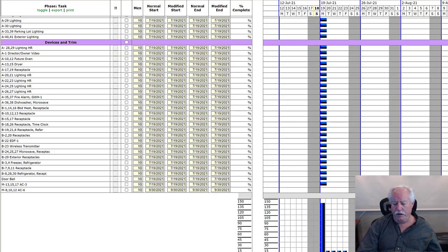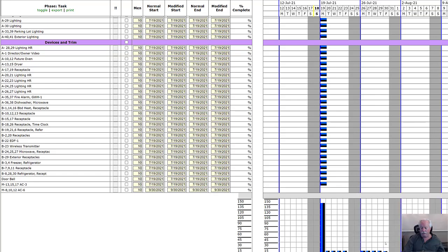If you have 10 workers one day and 50 workers the next, and then 5, and then 40, and then 3, that's going to be a problem, right? You're not going to operate your project that way. You're not going to say, hey, I need 50 guys tomorrow, and then let's get rid of those, and we'll just have 3, and then let's have 40 the next day, and then 2 on the next day. You're going to want to keep a pretty even number of people on site.